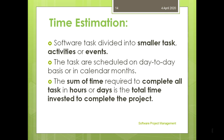Time estimation: as the name suggests, we will estimate the total time required to complete the software. To do this, the software task is divided into smaller tasks, activities, or events. The tasks are scheduled on a day-to-day basis or in calendar months. The sum of time required to complete all the tasks in hours or days is the total time invested to complete the project.